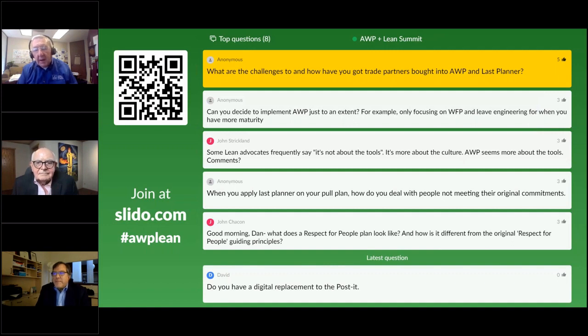And I let them know, hey, look, I may very well have to bid this steel package. You may not be the one selected, but I want to make sure I have somebody in here who can talk to me realistically. What does the market look like? What can you do? How can you help us on priorities? And I explain the priorities we're really going to need on this project. Is there even a chance of delivering those? What are the risks and what are the costs?